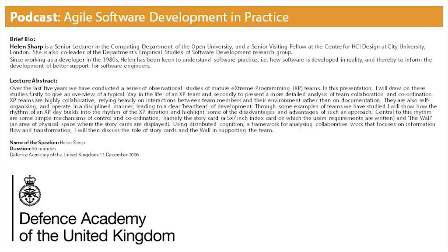In Team A, when they were doing this, they had a discussion with the customers and the developers about prioritizing. And the customers said, well, look, we really do have to have some of these cards come through this week. We have to have some of these stories done. And the developers were saying, but we have to move the server as well. We have to do all these things to find out about moving the server. And they came to a compromise where some of the customer stories got done, but more of the developer stories got done. So, again, in reality, there is some of this negotiation that goes on.